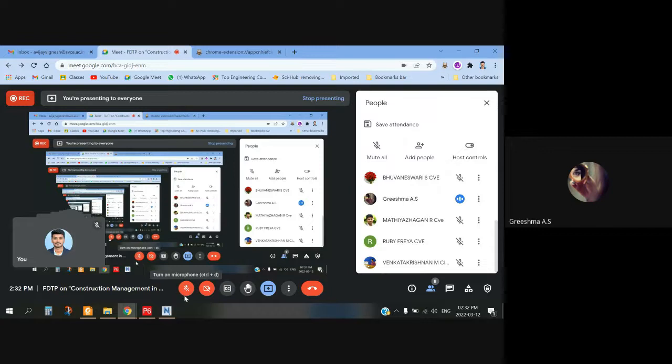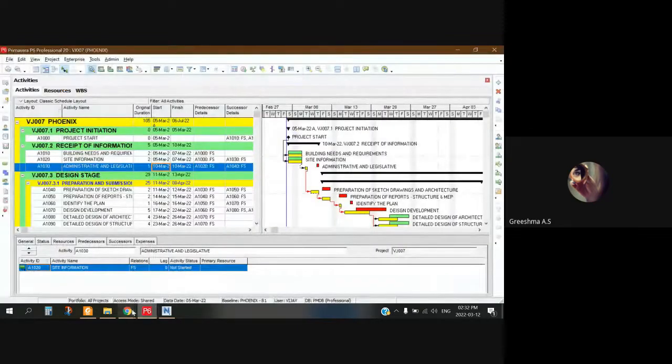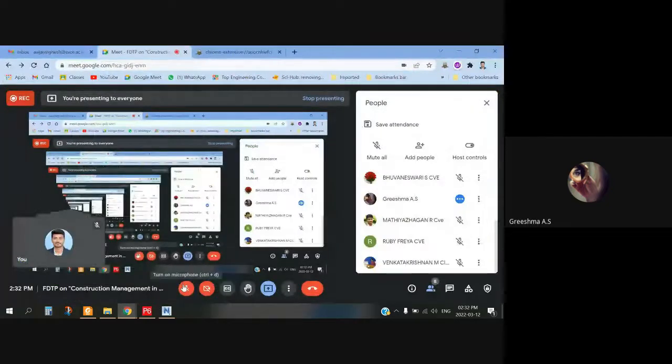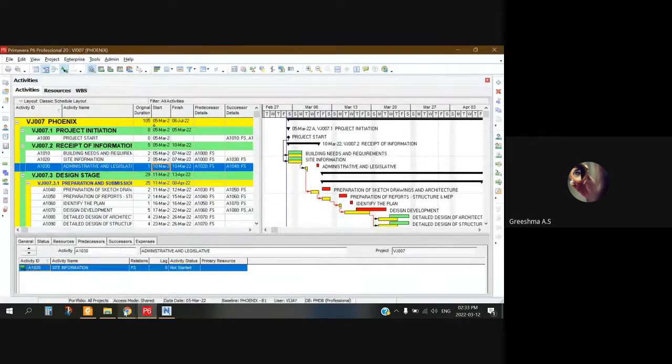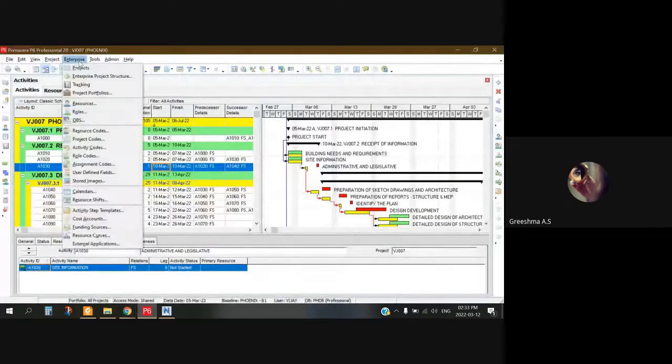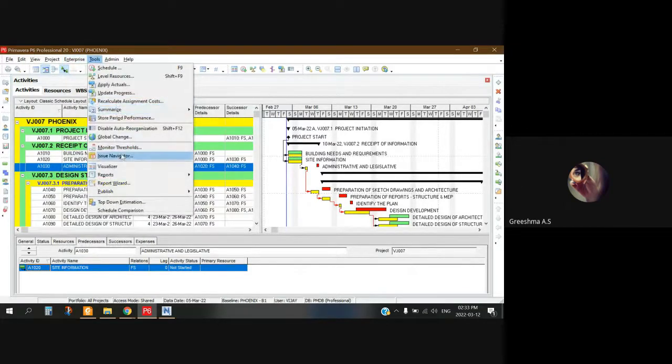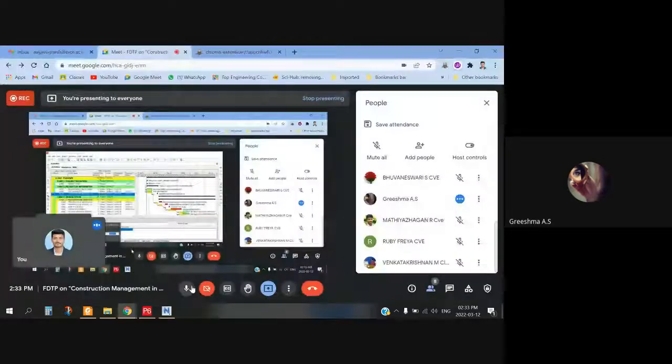So, for example, today is 12th March, and I have an activity to do on 12th March. But due to some rain or weather condition, I cannot move with that activity. So what will the project manager do? The project manager will update the schedule, and the baseline will be there. Baseline means we had planned to start the project on that day. But due to this crisis, a delay occurred, and the complete project will be delayed. This is only for tracking the project, or we can just compare the actual versus the planned one.